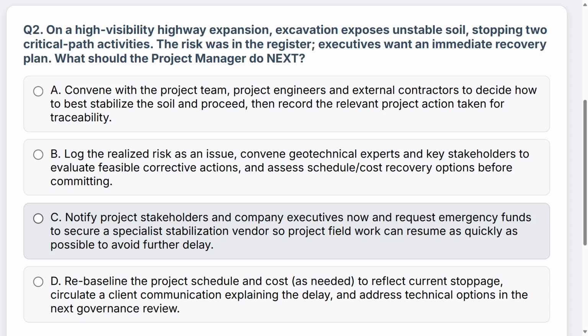Think about it. The problem is you have exposed unstable soil. The logical thing to do is to ask, why did this happen? What is the remedy? You've got to define the problem, identify the root cause for that unstable soil. And until you've done that, you shouldn't do C or D.